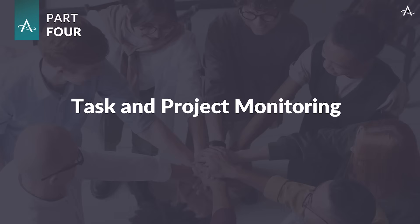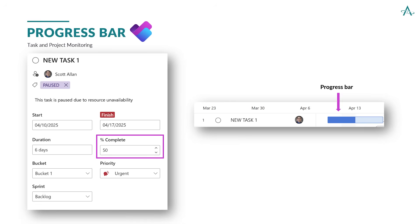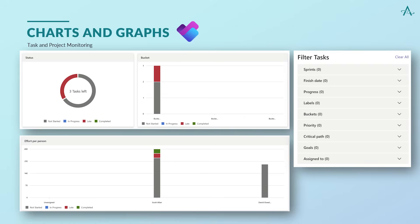Task management isn't just about assigning work — it's about knowing where things stand. Planner Premium gives you progress bars, charts, and graphs to spot what's moving, what's stuck, and where your focus is needed. It's how project managers stay proactive instead of reactive. Progress is tracked by adjusting the percent complete field in the task card. As this value is updated, the blue progress bar in the timeline view fills to visually represent how much work has been completed. Charts and graphs give teams a clear snapshot of task distribution, progress, and priorities. The built-in reports provide project managers with a quick look at overall status, workload by person, and progress by bucket. Applying filters helps hone these visuals, letting you zero in on specific sprints, priorities, labels, or assigned users.